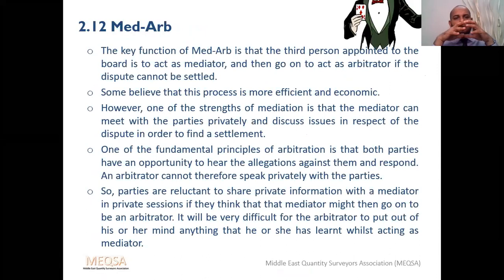Med-Arb. I told you, before arbitration, you should have some kind of dispute resolution process. What this process says is: go first for mediation with a person. If that fails, you go to arbitration with the same person. Why? Mediation will try in an amicable way to settle the matter. If you are not agreeing with him, then the rules and regulations come into the picture. He will become an arbitrator and he will give his decision.